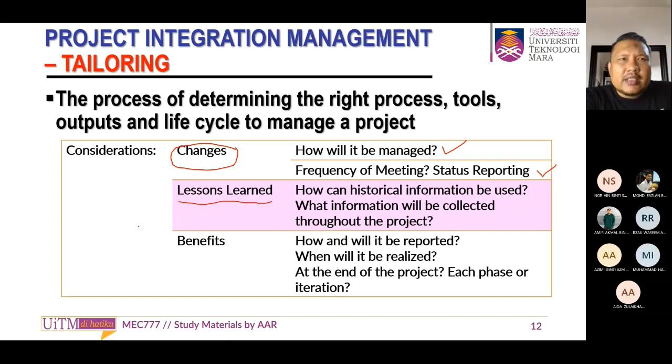Actually, when we started the process of applying to the CCAP, our construction had already started, because we knew this was a bit late. We had already completed our piling and our base. Then we got the comments from the CCAP, so we needed to change a lot of things. For example, room size, we needed to change. The corridor.